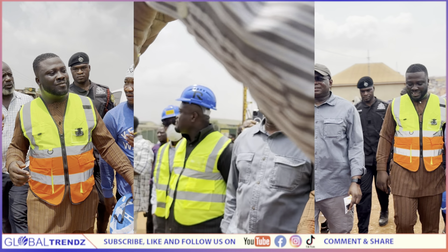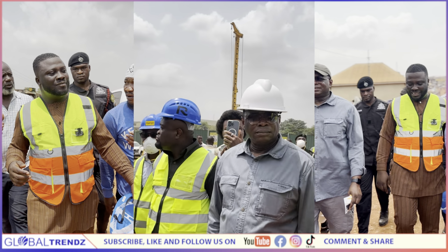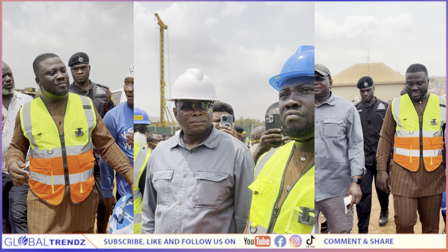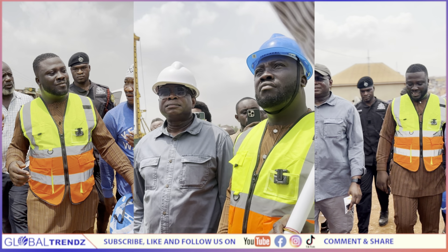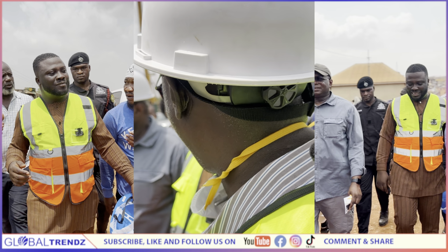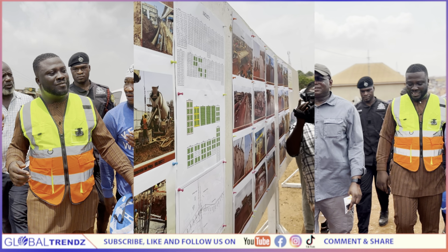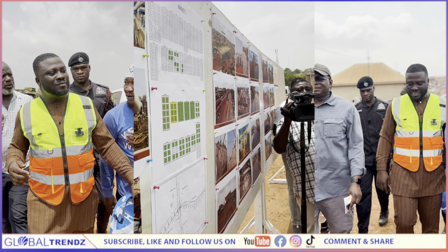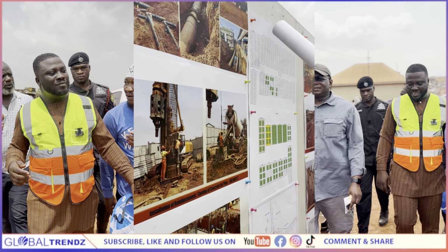For the runabout, we have had to make a lot of relocations from where we are standing. Actually, it is the central point for the distribution network of Ghana Water. So for construction or any power work to begin, you have to make sure that all the lines there are not interrupted. It explains why the contractor has not been able to do as he planned originally. So these are some of the relocation works that we have done.